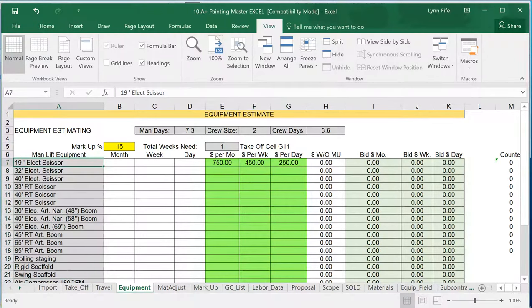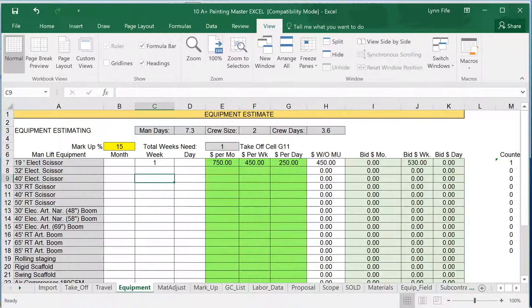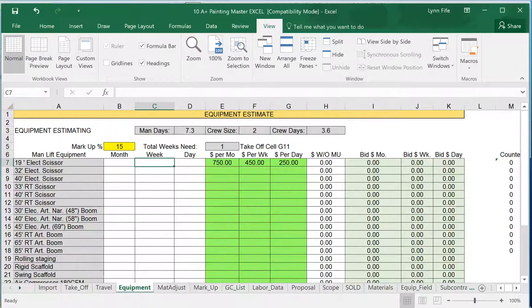For the 19-foot scissor lift, if you needed that for one week, you just simply type a one week here, and it automatically calculates that and puts that into your final price. We'll delete that just for purposes here.